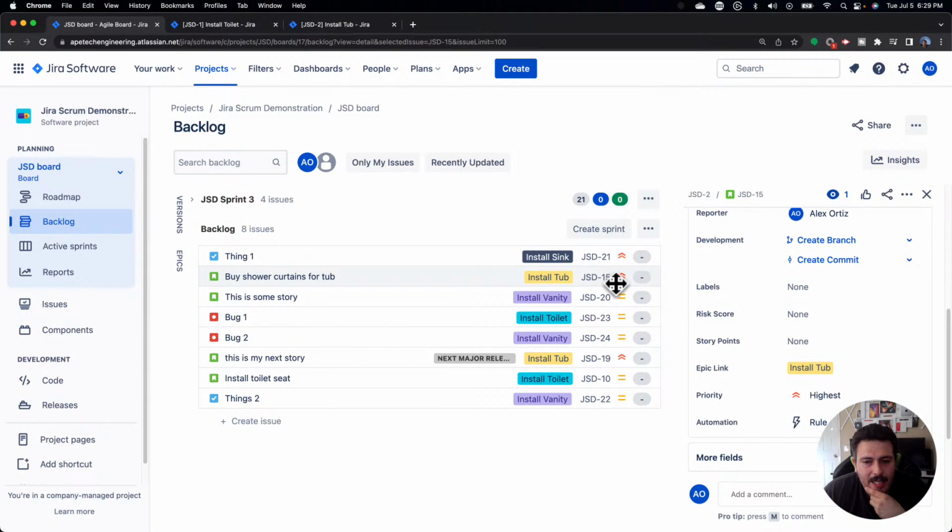And ideally, you can do a couple of things with your priority. One of them is establish PEMDAS, order of operations. I just love calling it PEMDAS, right? And you can say, okay, team, here's the rank. These are all important. These all have to be worked on in the sprint. But if you had to pick an order of operations or an order of importance, these priorities, pick the highest, then high, and then medium, then low, and then lowest, right?